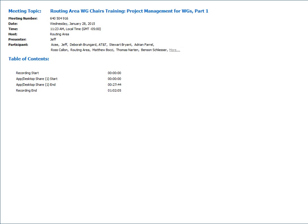It actually is. The quicker you make a revision and get it in a document and get people reading it, the sooner you're closing an issue and the less likely you're going to have somebody read the old broken text and spit out the same issues. And so in some sense, by having a small amount of work going on steadily over time, you're going to make much more progress than having a lot of activity only 3 times a year. But be very pragmatic about deadlines and what people can actually deliver.